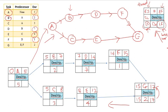So this will become 15, and this also will become 15. So 15 minus 1 is 14, and this 15 minus 4 is 11. So this 14 will become the LF for this previous activity, 14. So 15 minus 7 is 7. And this one will become here. So this is 7 minus 2 is 5, and this is 11 minus 3 is 8.